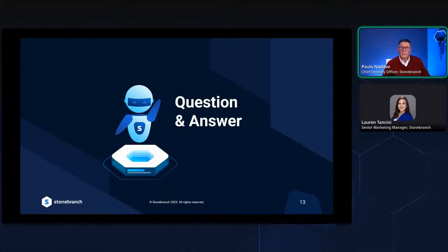So we also created a visualization tool that can plot the graph of dependencies and allow you to show where the clusters are, right? So what are the probable clusters that would make for a good technical breakdown of the jobs into multiple groups? And I say technical breakdown because, as I mentioned before, for us technically, the easiest way to convert this is if we can find mutually exclusive groups that we can convert one at a time, right? But it's very unlikely that we are going to find this because these mutually exclusive groups will impose a dependency on the applications outside of the workload, right?